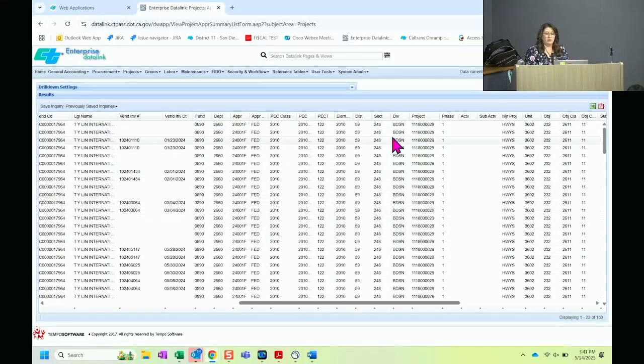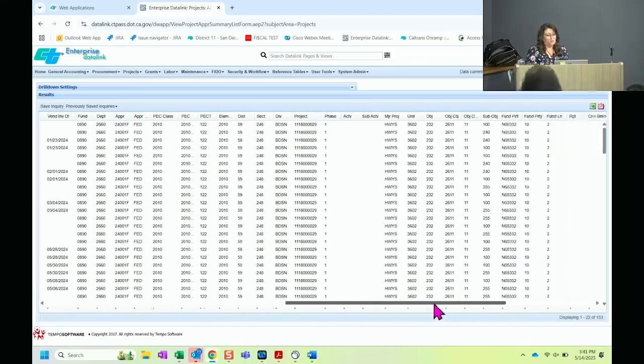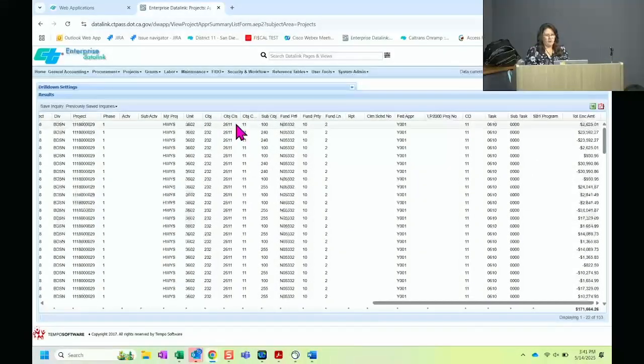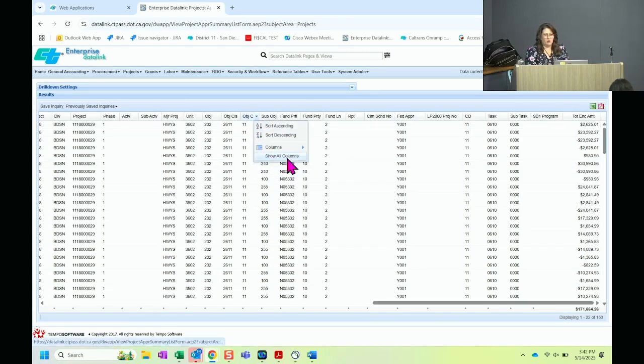It paid against what unit, what division, what district, what object code. This is everything. Object class, that we showed you earlier in the beginning. Object classes and object codes, those numbers that we were talking about. You're going to see all of this information on the journal, and you're going to see these numbers and wonder, what is that? If you hover over it, it'll tell you 11 object class. What is that? Oh, it says consultant services. Oh, that's for my A&E payments, right? So you can see them by hovering over, or like Nikki showed you earlier, show all columns. It'll turn everything on, and then you can decide what you want to see in Excel, and hide it later.